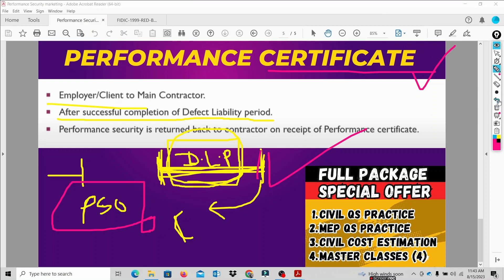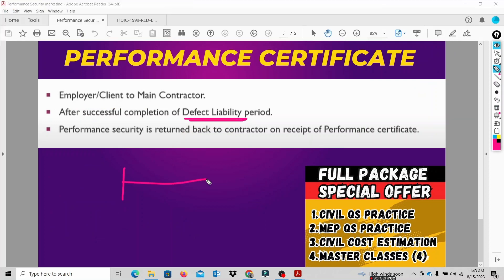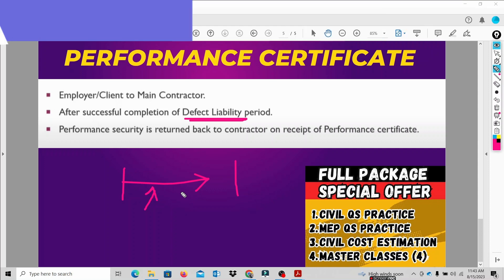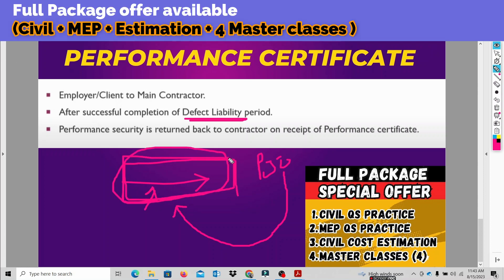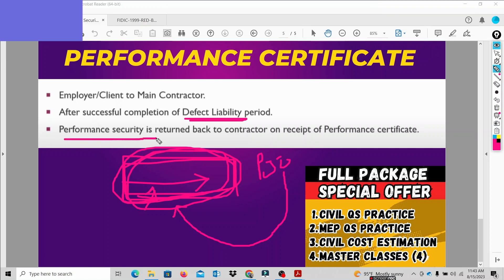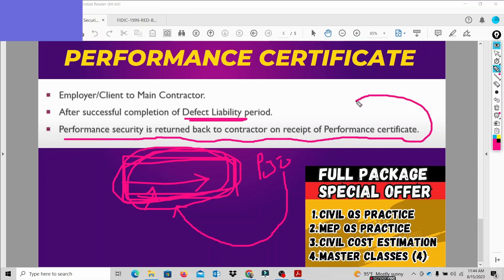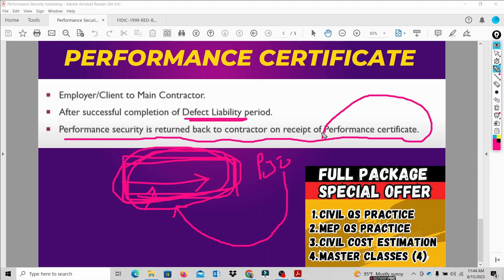During the Defect Liability Period — the 1 to 2 year period after project completion — any defects or damages must be addressed. Once the contractor successfully completes this period, the client issues the performance certificate, and upon receipt of that performance certificate, the performance security is returned back to the contractor.